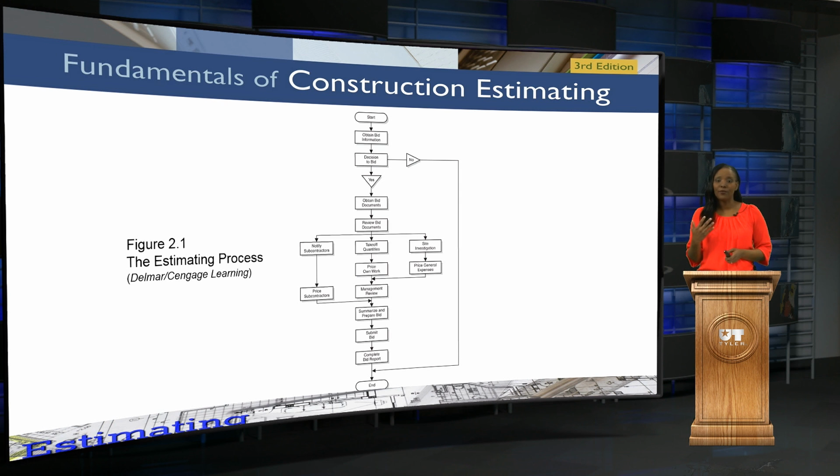You may even do what is called an actual risk analysis, where you go in and you look at all the various assumptions to see what are going to be the problems. If there are too many problems adding up against you, then you might want to back away from this project, or there are some alternatives. Maybe this becomes a joint venture type project, or maybe there are just some other things that you could do to approach it. So it's really you creating this game plan before you just step over into saying, yeah, I'm going to bid on this project.